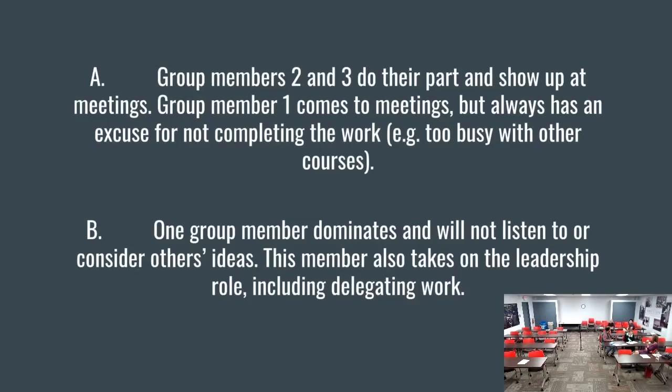Yeah, so I think in a lot of respects, it's a great attitude to have as a group member, the willingness to step up and make sure that things happen. And the project management side of it that you were describing is the best proactive approach. If you notice this happening, that person gets an earlier internal deadline so that you have time to put your backup plan into play.